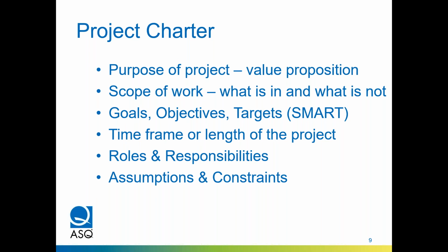Projects need to start with a common understanding of what the scope of work is, what the goals are, et cetera. And we use a project charter for that. And again, an example of the project charter is in the download available to you as a handout. It states the purpose of the project, the value proposition, or why is this project important? Why do I need to spend my time?